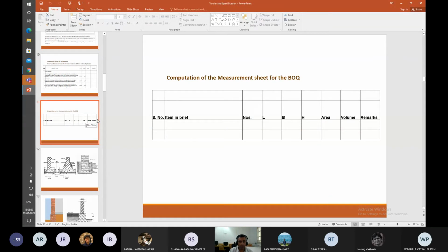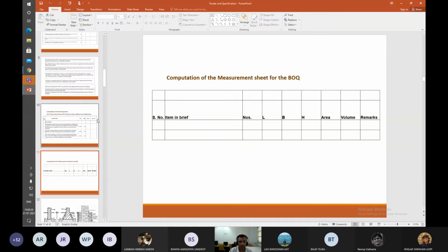So Jimmy, what, Bhushan, if my footprint is not a rectangle? Like if I have a circular base or a triangular base, then do we imagine it as multiple squares, or use the regular formula? See, you're working on AutoCAD. Sometimes you can directly find out the area. Suppose you have a circle, no? So you mark the circle on CAD, find the area of the circle, directly enter the area of the circle here, give the height, and you will know the volume immediately.